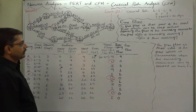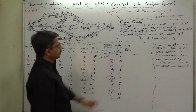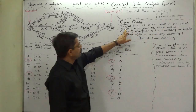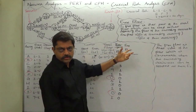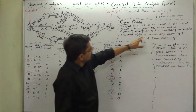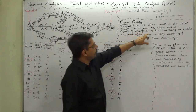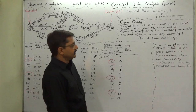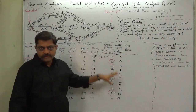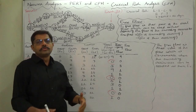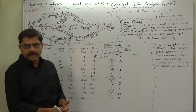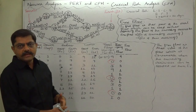First of all, what is free float? Free float is that part of the total float which can be used without affecting the float of the succeeding activities. We can use total float, as we know, to delay or extend or postpone a non-critical activity without affecting the deadline of the project.